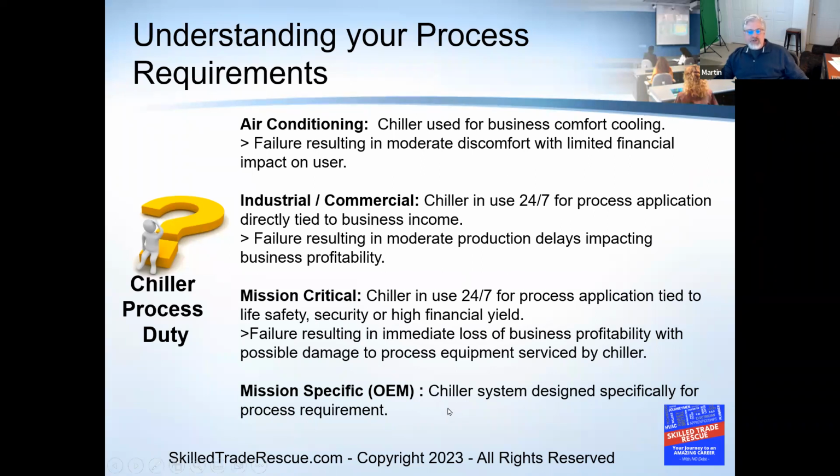And I would caution you to make sure that the markups that you use for mission specific custom equipment should be about 10 to 15% more, unless you've done a few of them. They should be higher than all these other three categories, because you will be doing some babysitting, because these custom applications tend to have a lot of variables, and a lot of them you don't find out about till the end. I was mentioning pumping issues. This was where you would run into that.